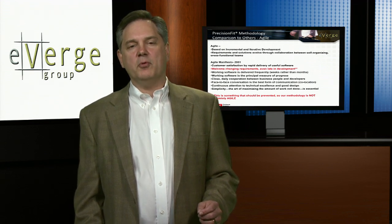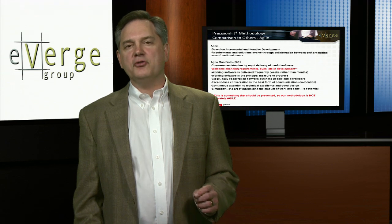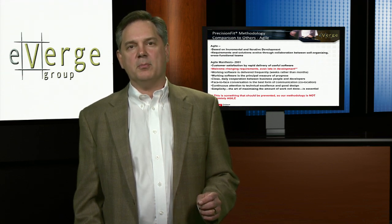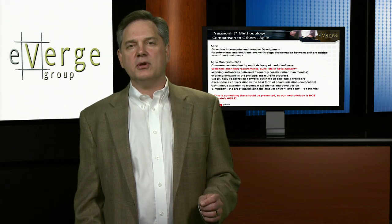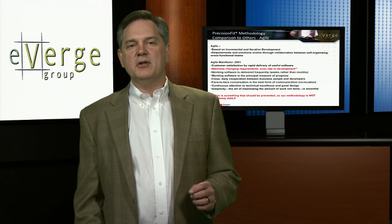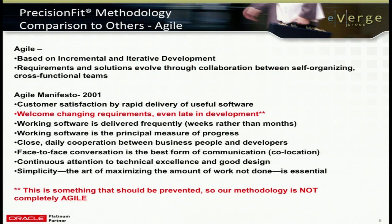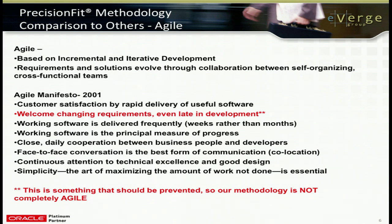On the other end of the spectrum is the Agile methodology. There are some really neat concepts in Agile that we've actually adopted in Precision Fit — it's an incremental and iterative concept where requirements and solutions are allowed to evolve through collaboration. However, the Agile manifesto, published in 2001, encourages changing requirements even late in development. As you'll see in your career at eVerge, we want to manage scope and encourage changing requirements to a point, but not late in development — that's going to be costly and cause budget and time overruns.